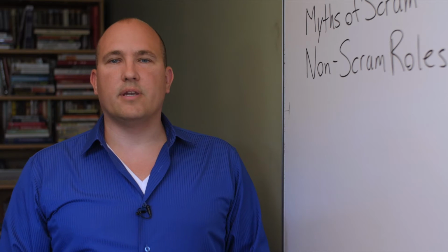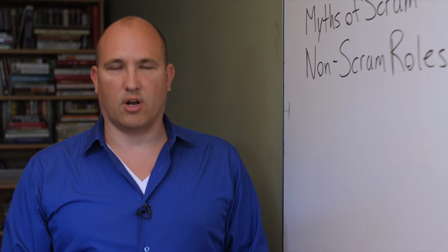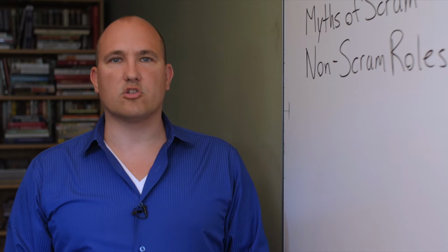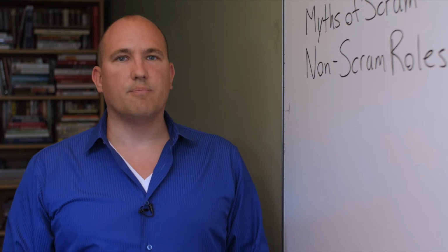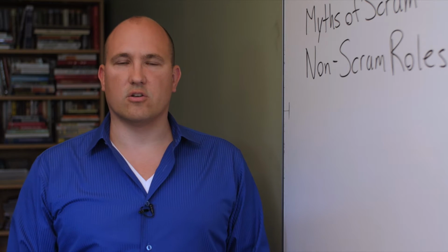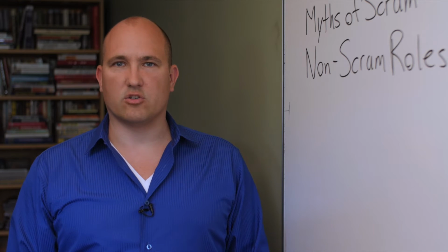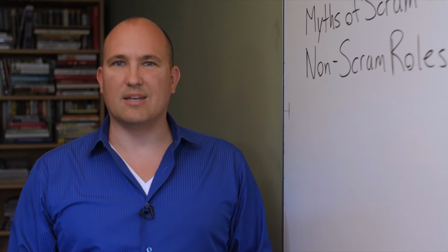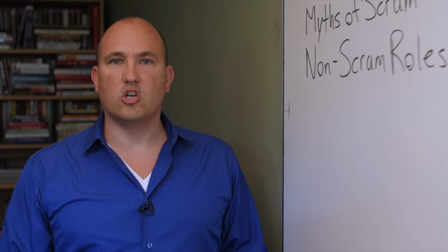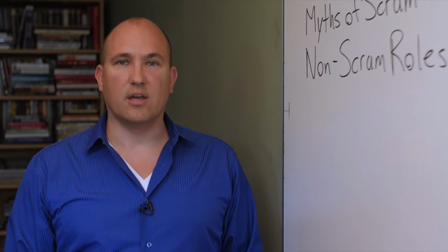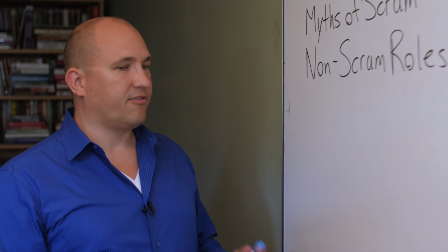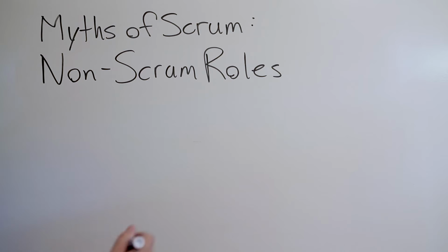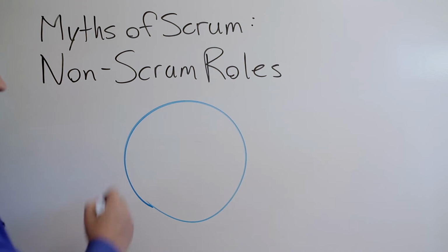A very common misapplication of Scrum is to include non-Scrum roles inside of your Scrum team. For example, business analysts, testers, user experience professionals, software architects, database admins. These non-Scrum roles actually are not allowed in Scrum. This is a firm rule of Scrum. So let's look at what is in a Scrum team.